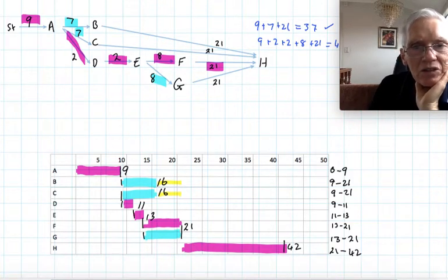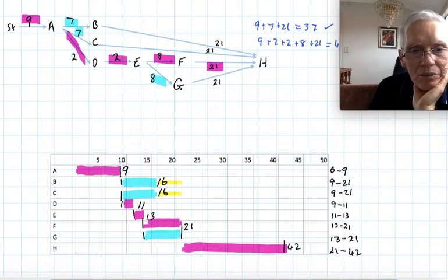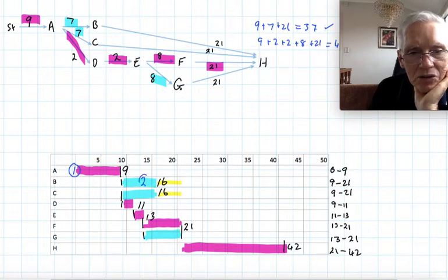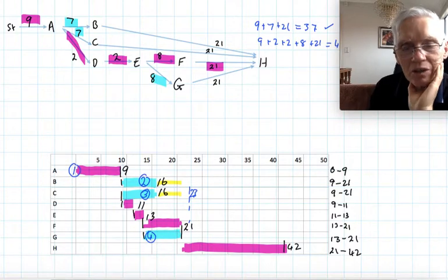So basically you need 4 different people here, because person 1 does this colour, person 2 is doing this one, but at the same time you've got person 3 working here and person 4 working here. If I push one of these out here, this is 7 minutes, 16 and 7 would go to 23. That would mean we can't start this at 21. So we have to get 4 people working to get it done in the quickest time.